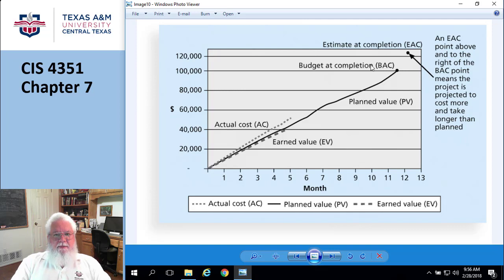Using this technique helps out. Let me just say, for example, a lot of people tend to oversimplify. For example, if I came to you and said, well, we're 50% through the project, does that mean clock time? It's going to take 12 months and we're in 6 months? Or does that mean, what if the bulk of the work was done in month 2? Right? So this is a way of not oversimplifying. I'm 75% complete, or I've used 75% of the budget, or 75% of the schedule. Those statements are terrible oversimplifications and don't do justice.